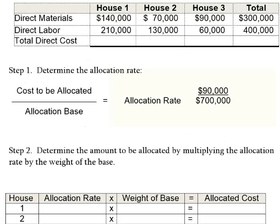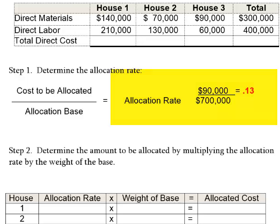Step one: determine the allocation rate. In the numerator, put the cost you want to allocate — the $90,000 of overhead. In the denominator, put your base, which is now $700,000 of direct cost rather than just three houses. So $90,000 divided by $700,000 equals 0.13. This means for every $1 of direct cost — whether direct materials or direct labor — I'll add 13 cents to cover the overhead cost of the business.